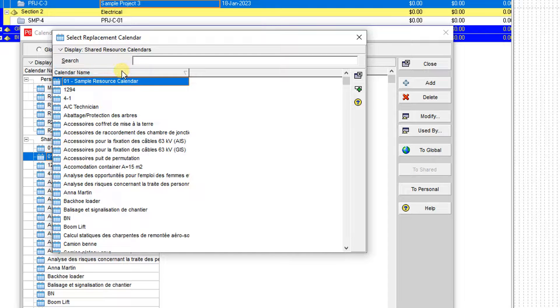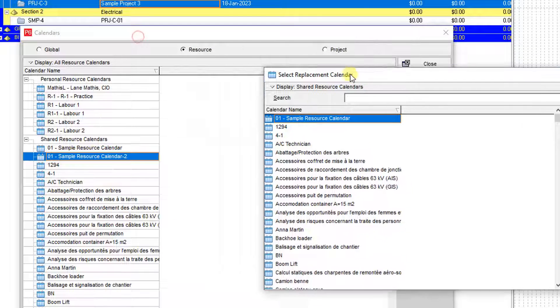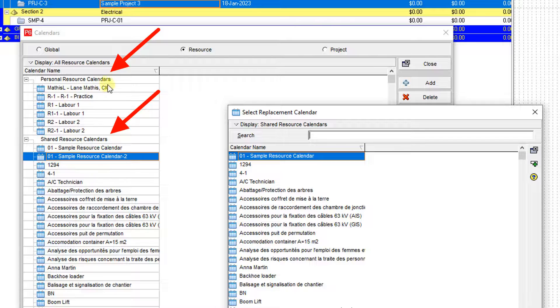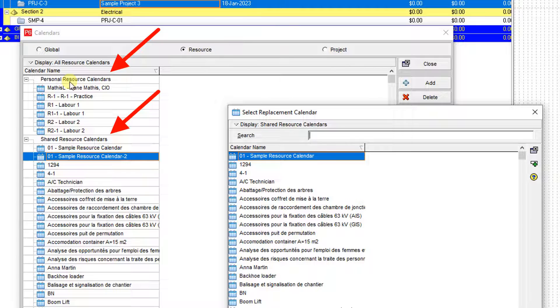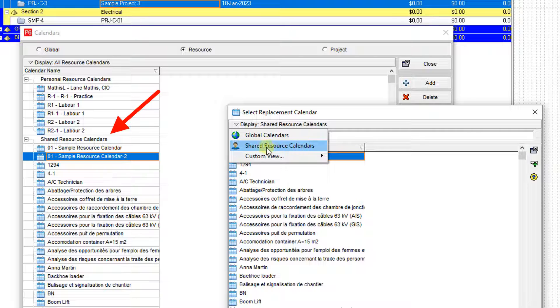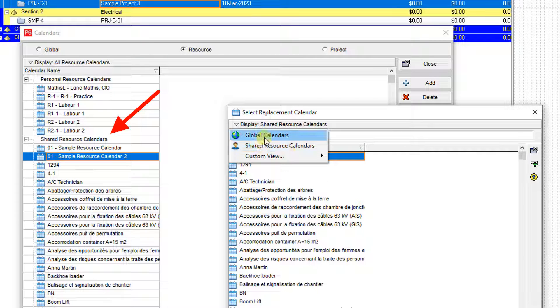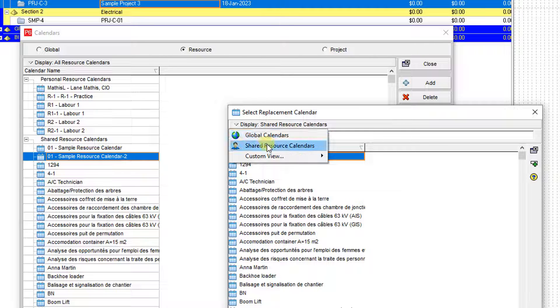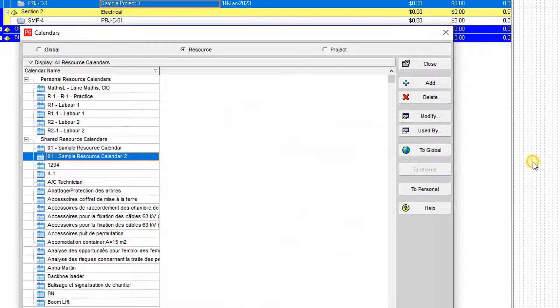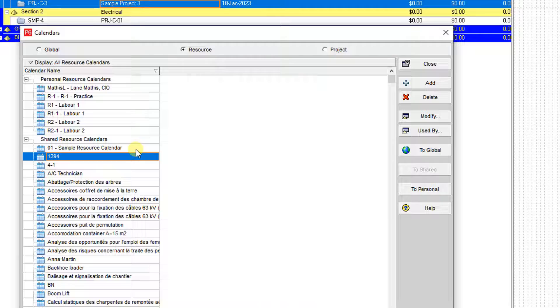But be careful—if you look at it here, we have the personal resource calendar and shared resource calendar. Here you can only go for shared resource calendar or global calendar. These two options are available. So I select the shared resource calendar. I want to merge it to the one sample resource calendar. Then, as you see, it's going to be removed from my pool of calendars.